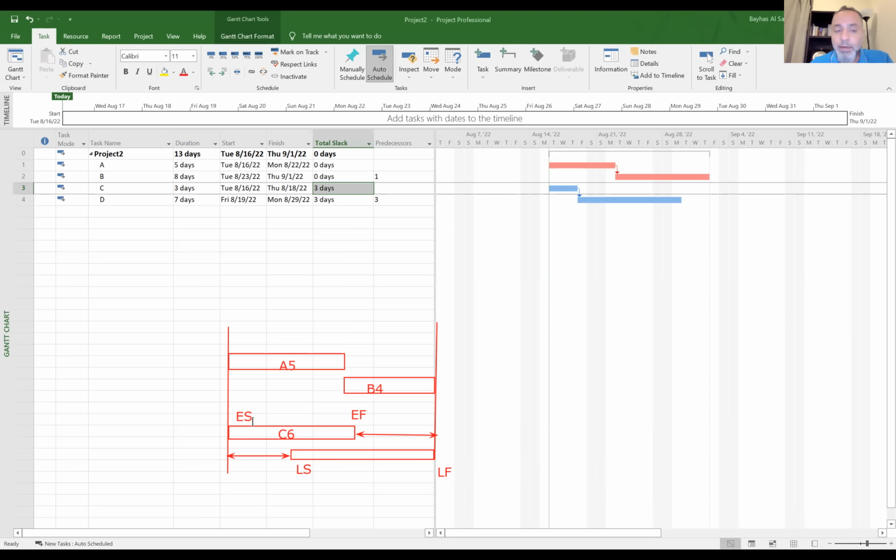In our example, the early start is 0. So you start at 7 o'clock in the morning. So this is 0. And since it is 6 days duration, the early finish is 6, right? You finish on the 6th day. But if you delayed as late as possible, now the last day on the project is the 9th, right? So the late finish is 9.